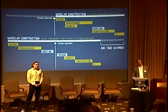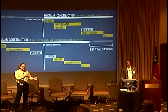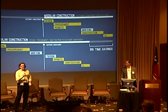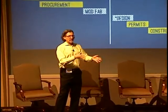someone like Schneider decides to build a modular unit that they're going to sell as a standard spec catalog item. Exactly, and they do it up front. I think maybe the big leap there is, and it'd be interesting to see what some people's take is, there was APC infrastructure, which was kind of in-room stuff, but is it a 500 kW load block or a 1,000 kW load block? Are people going to start to pre-procure and pre-build those products, be ready to go when the order comes, and then deploy it in 16 weeks?